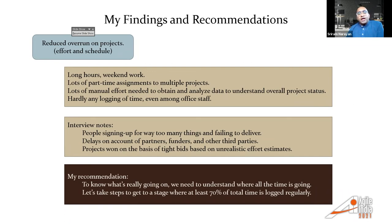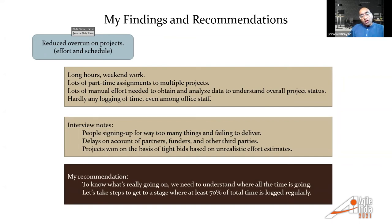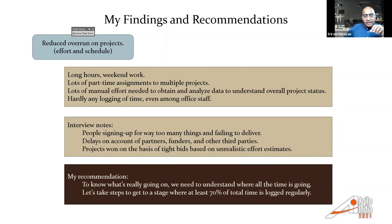With respect to voluntary adoption of the tool — my finding was that there had to be a shared understanding of the purpose of the tool. Some people were using it more like a document sharing tool or communication archival tool rather than a project management tool. The tool had concepts like projects broken down into milestones, then tasks and subtasks — you had to use them in a particular, careful way if you wanted useful reports. If you used them whatever way you saw fit, it was not possible to get useful reports out of the tool.